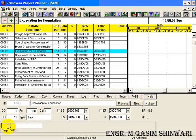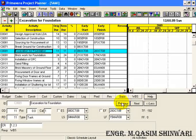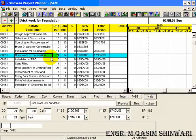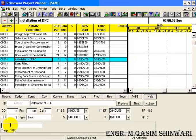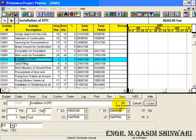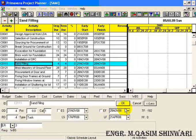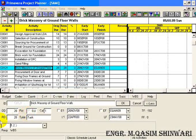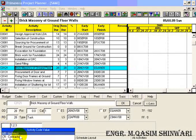Click on next. Excavation of foundation C0081 is the responsibility of contractor and lies in the construction phase. In construction, select contractor. Similarly, you can define the WBS code and the responsibilities of each and every activity. Brick work of foundation is the responsibility of contractor in the construction phase.